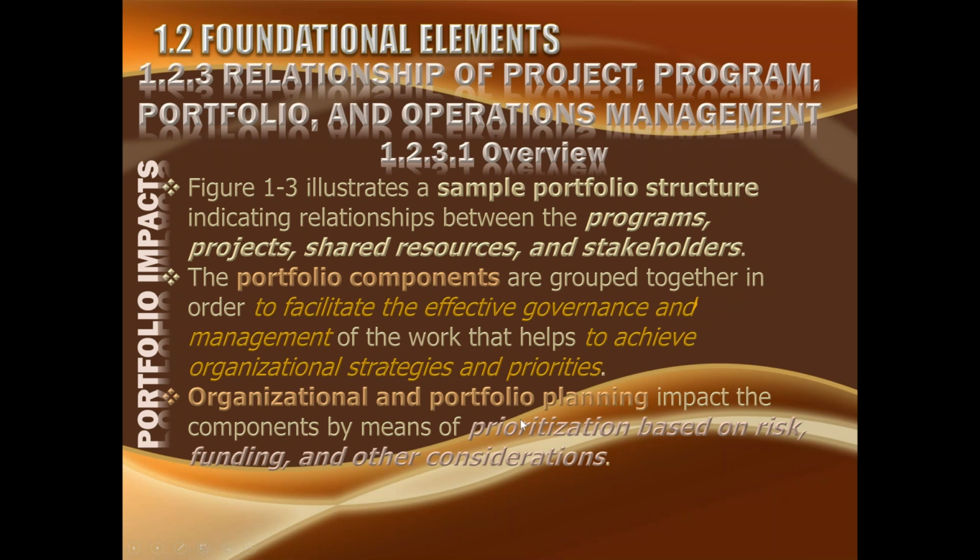Organizational and portfolio planning impact the components by means of prioritization based on risk, funding, and other considerations. So portfolio may decide that if a project is too risky or it is lower in prioritization, it may be closed down. Funding is limited, so projects may be affected by that.